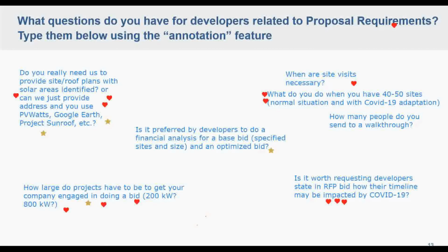Yeah, and the experience we've had with production guarantees on EPC deals, there's always a commissioning test. They basically have to make sure that it's within a certain percentage of what the HelioScope showed it would produce at that point in time, to make sure that the system's up and working. To get a production guarantee that's high, I think like 95% was the type of number, we found it was not worth the cost.